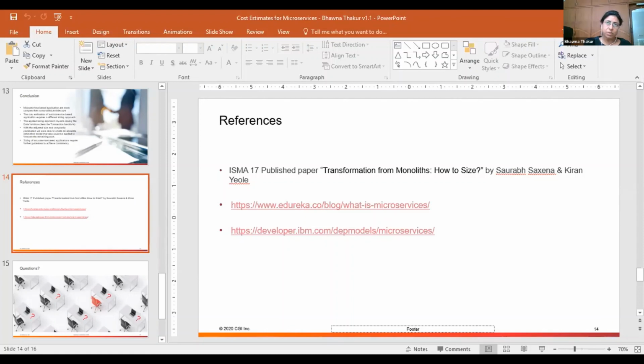I would say it's not the productivity, because now we are looking at the application boundary itself. If the application boundary is too large, then you would say yes, the productivity is less. But that's not what it is. Actually, a microservice has its own database. So the way it is constructed, it's constructed like an application on its own. Even if we look at some large portfolios of the clients that we deal with, there are many small applications, and we treat them as separate applications because they are delivering a certain functionality. They are able to communicate on their own. So that is where the application boundary comes into place.